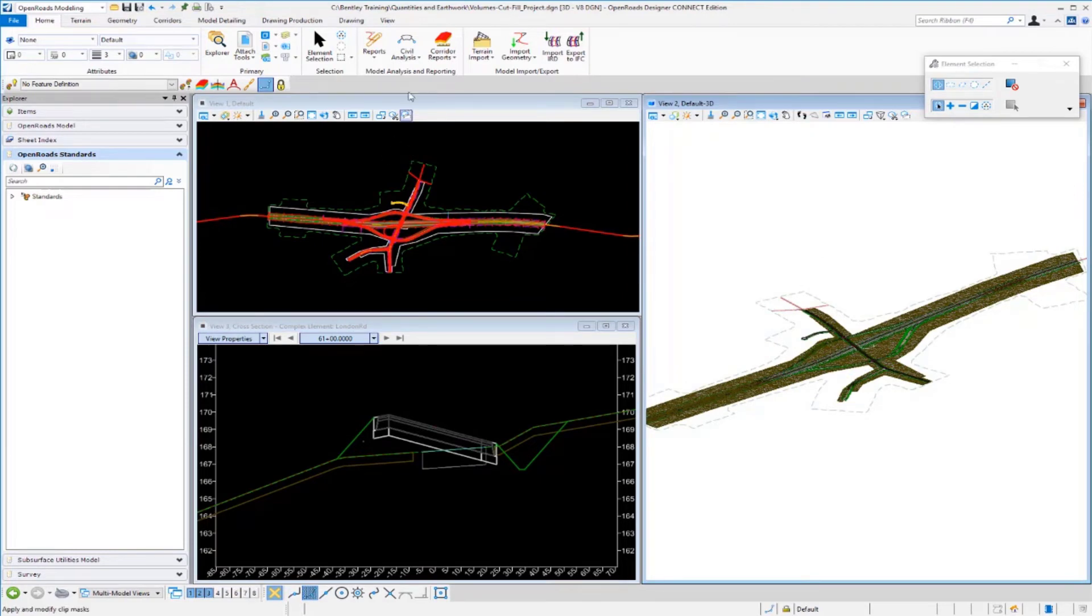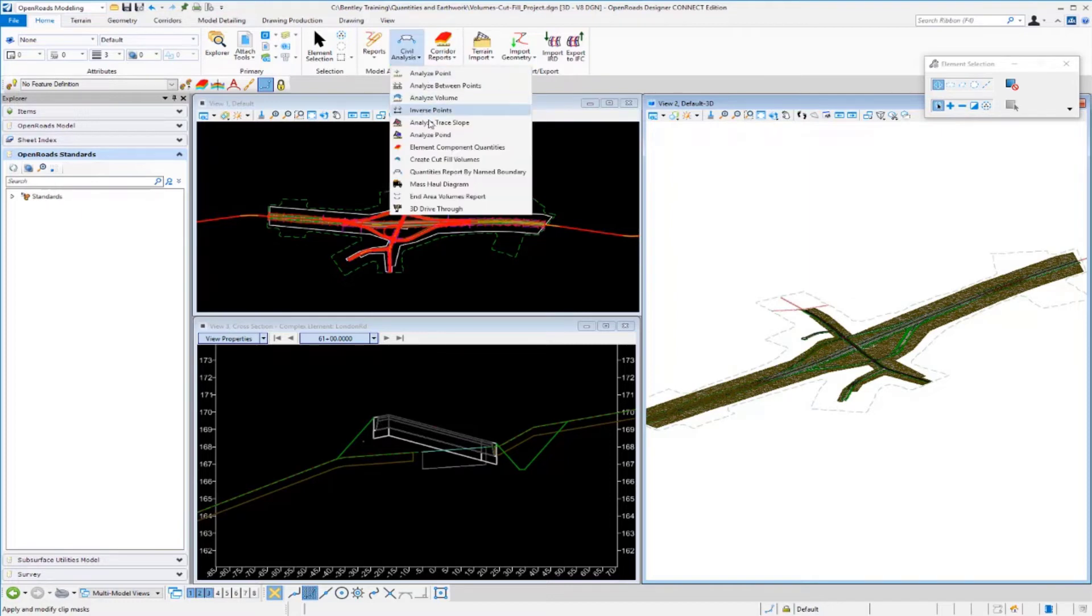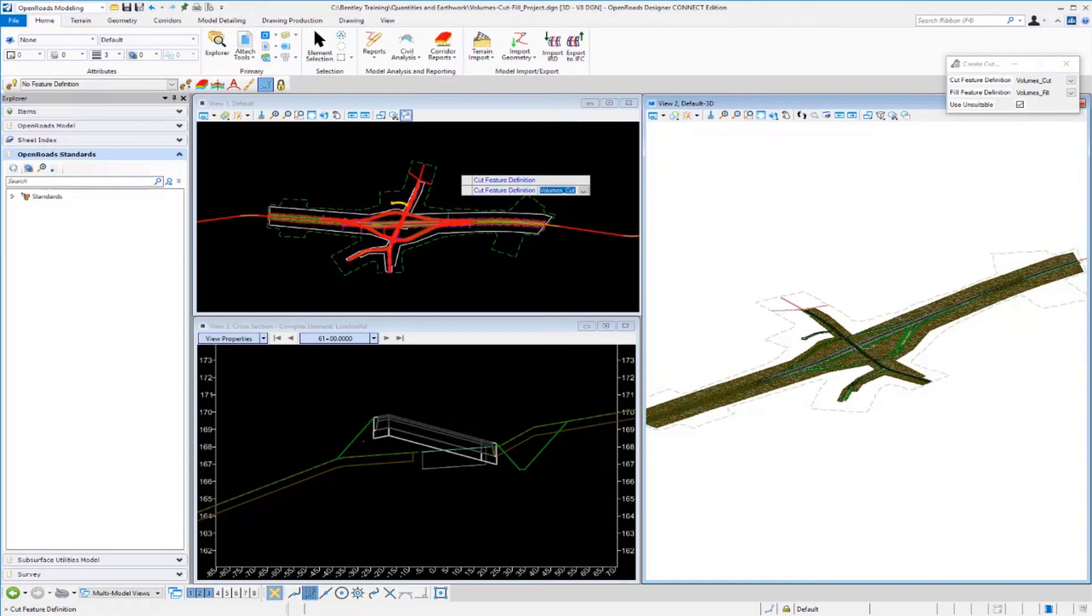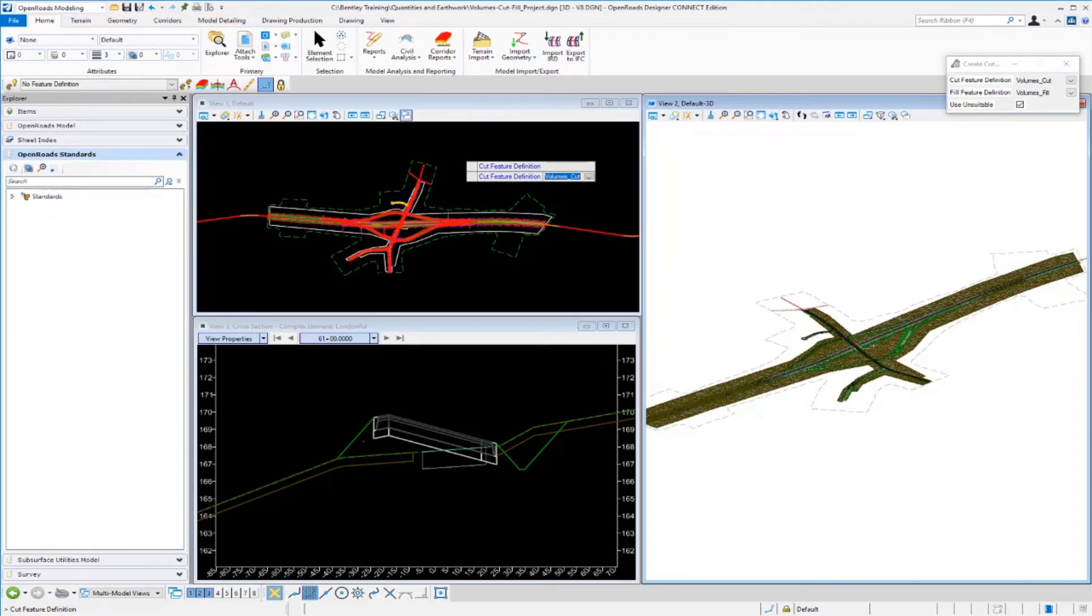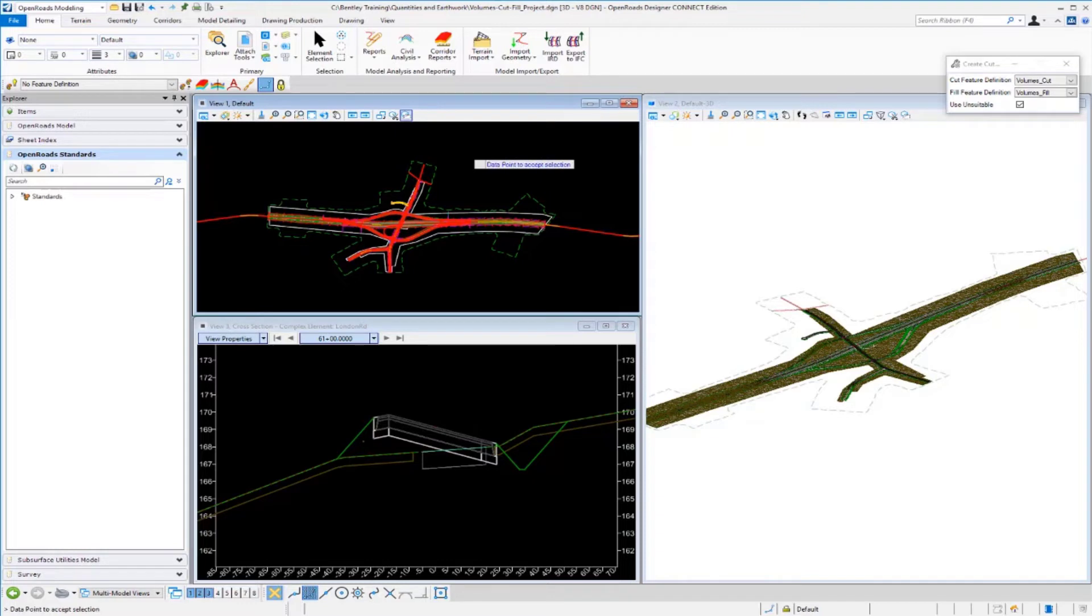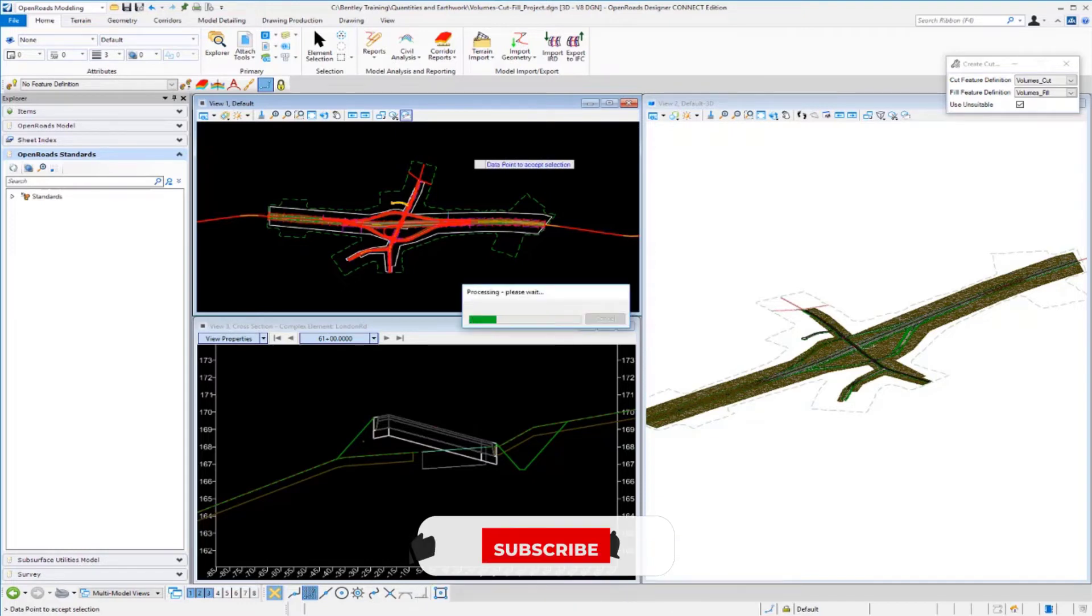Again we're going to go back to our same tool under Model Analysis and Reporting. We're going to go back to our Create Cut and Fill Volumes to generate our 3D graphics that represent our cut and fill and our removal quantities. Again we're going to be using our feature definition called Volumes Cut and Volumes Fill. I'm just going to left click through the prompts. We definitely want to use unsuitable material so we're going to toggle this to yes and left click to accept, and then data point to process.